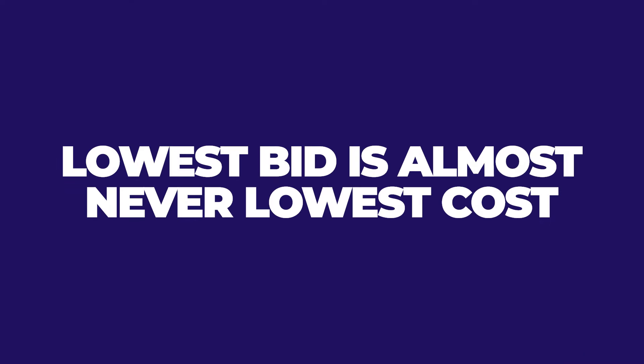Some things that can go wrong with bid leveling: if you send out a vague RFP without clear expectations and no standard formats, you'll get bids in different formats and waste days or even weeks interpreting and comparing information, then have to go back with clarifying questions for all the bidders. Another mistake is not digging into the variances enough to get clear and complete information. And one of the biggest mistakes is selecting the contractor based on lowest bid — lowest bid is almost never lowest cost.